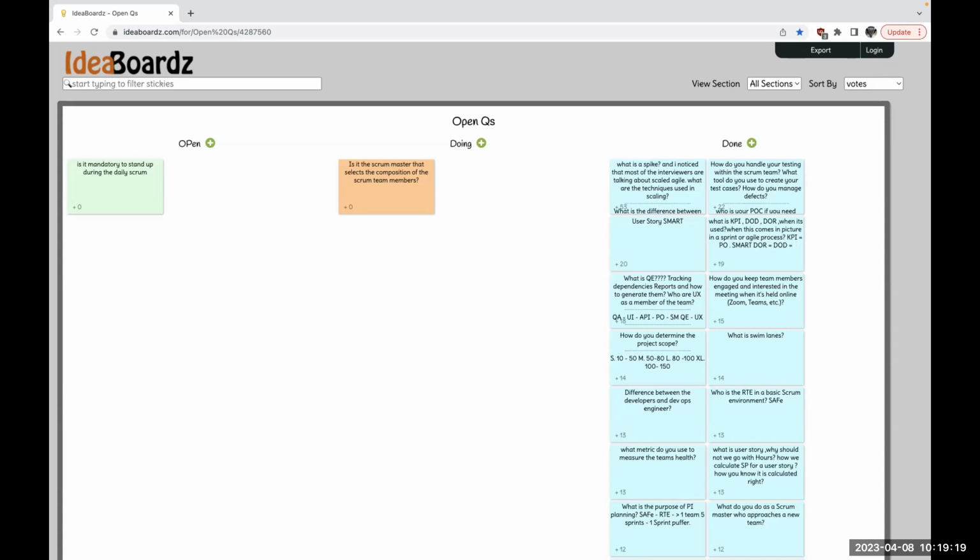Maybe at the end of the stand-up, somebody would say, I'll help. And then you'll be like, okay, this is the 16th minute. Or sometimes we call it the parking lot, which is after the stand-up. And now I can tell the person that is stuck, now you have the screen, you can share it. And whoever is interested, please feel free to hang out. If you're not, our stand-up is over, feel free to drop. And now I can drop as well, and I can tell him, John, do you need me in the call?